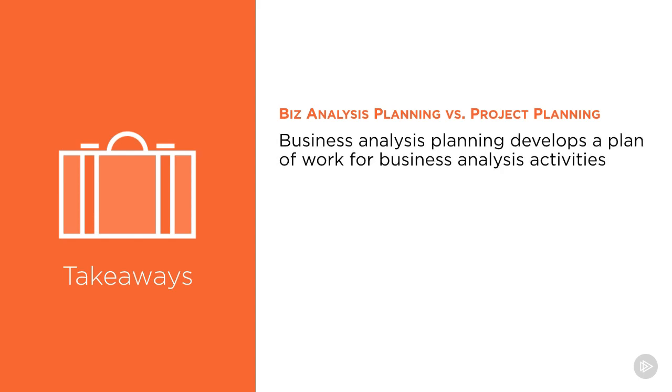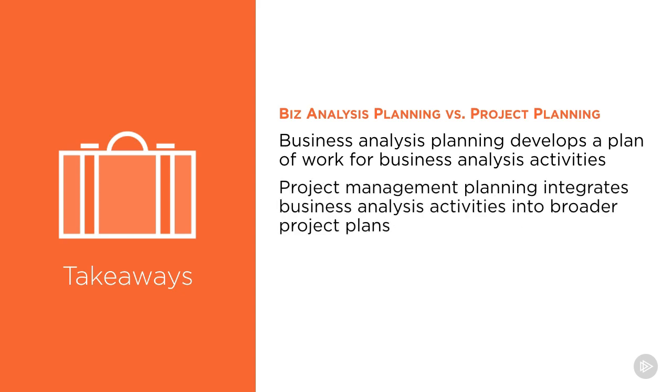When comparing business analysis planning to project planning, we have to understand that business analysis planning develops a plan of work for our business analysis activities. This includes determining what the business needs are, converting those into requirements that we can somehow meet through eliciting information from stakeholders, and helping to set a roadmap that project managers can follow in order to understand what objectives need to be met. Project management planning, on the other hand, focuses on actually completing those objectives, but also on integrating business analysis activities into broader project plans, given that many of the same people are often involved both early on in business analysis and later once project work has begun.